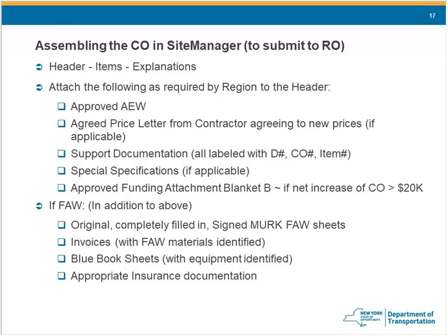Hey, Eric? We have feedback. Yep. Yeah, I'm sorry. I just wanted to point out that actually the new Merck 26 and 27s do have signature fields. Oh, they do? Yeah, it was updated about a month ago. Okay, so both of them are on the web with signature fields. All right, I will distribute those to my guys for sure. Okay. All right, so scratch what I just said about the Merck 26 and 27. They now have signature fields, so they don't necessarily require an agreed price letter, though it can't hurt to have one anyway.